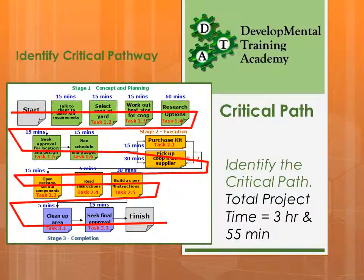From there you identify the critical pathway. The critical pathway is the shortest amount of time in which you can complete your project. Anything in series is always part of the critical path because you can't compress that part — one thing leads to the next. Where there are parallels, such as at the start of stage 2 with tasks 2.1 and 2.2, the first is 15 minutes and the second is 30 minutes. You can shift the 15-minute one around but you can't compress 30 minutes, so the critical path goes through the 30-minute component. Task 2.1 is not part of the critical path but 2.2 is, and the rest continues as series. Adding up all the times on the critical path, the total is 3 hours and 55 minutes.